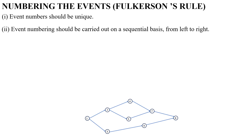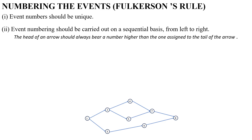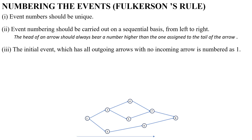Second rule is, event numbering should be carried out on a sequential basis from left to right. The head of an arrow should always bear a number higher than the one assigned to the tail of the arrow, which means the head event should always have a higher number than the tail event in the respective activity.